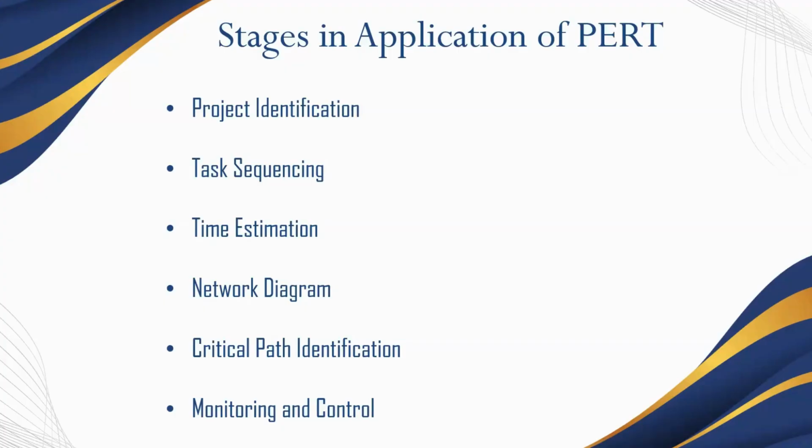Calculate the earliest start and finishing time for each task. Calculate the latest start and latest finishing time for each of the tasks by performing a backward pass. Monitoring and controlling: regularly update the PERT chart with the actual progress, continuously monitoring the